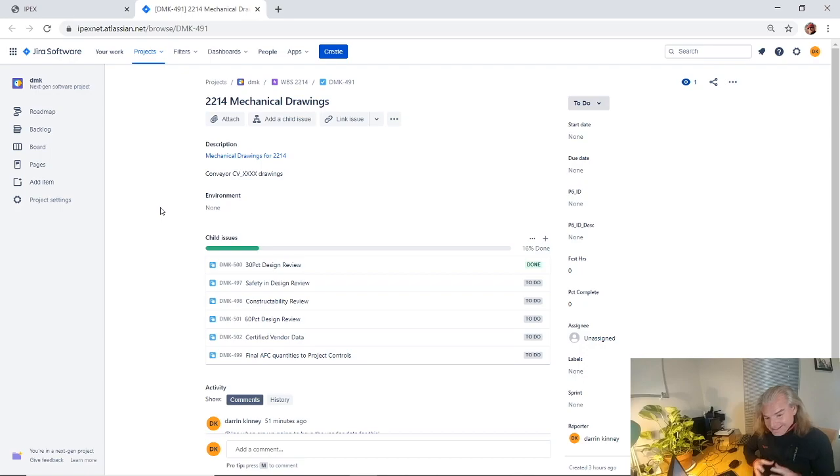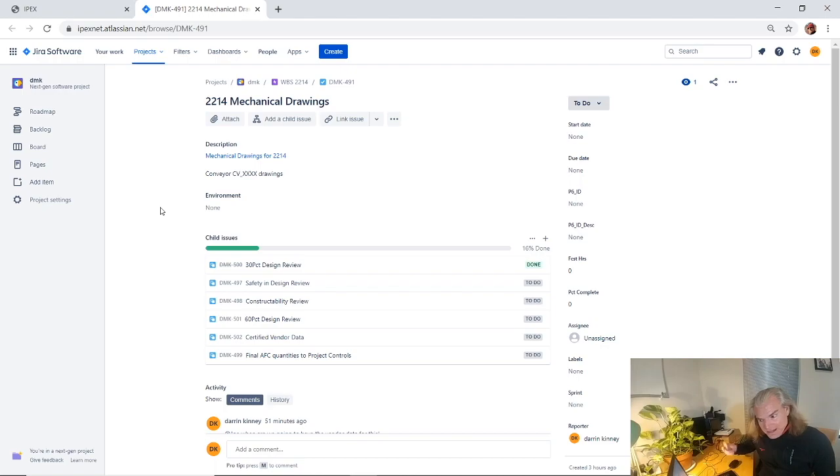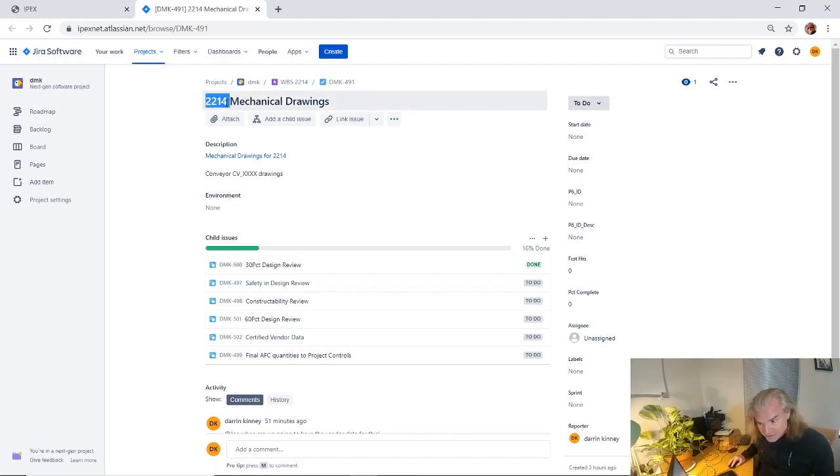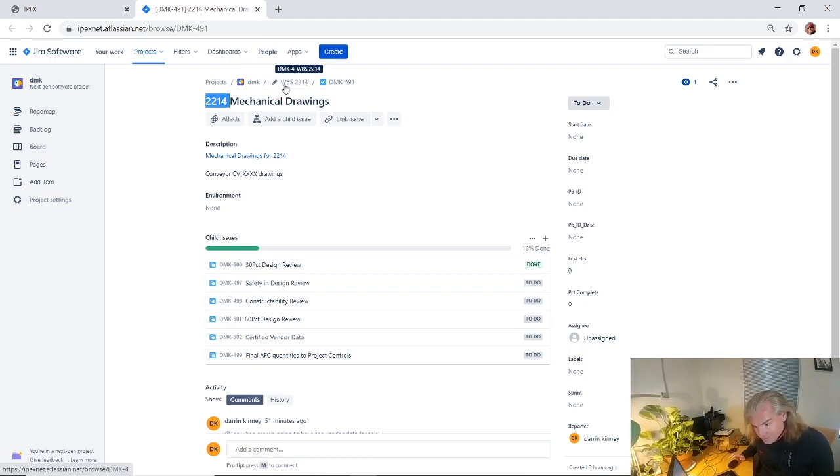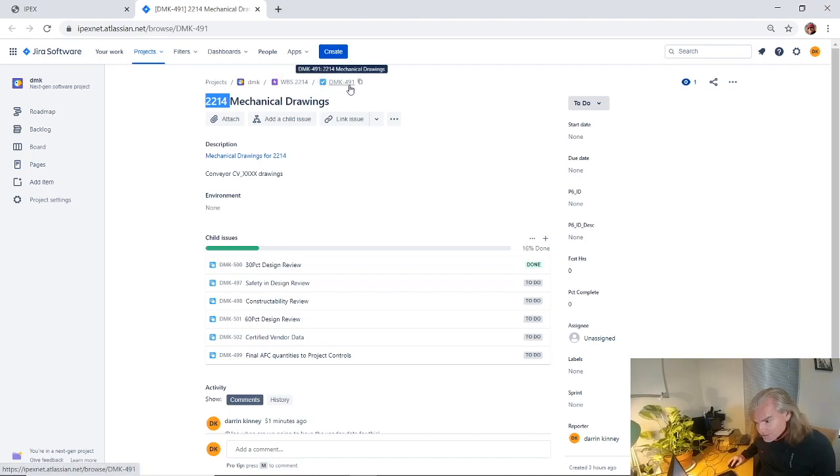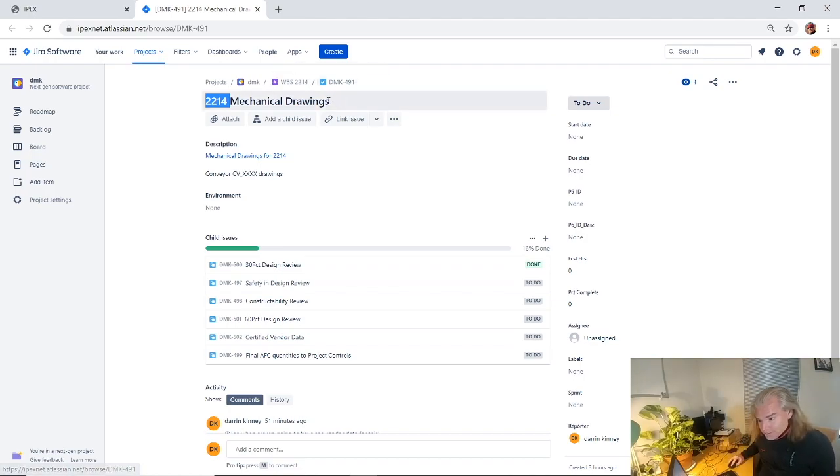Now we've actually set up a JIRA task for WBS 2214. We actually even have an epic, that's what we'd actually call WBS. So the epic is 2214 and underneath that we've got a task or maybe even a user story for mechanical drawings, whatever layer you'd want to put on there.